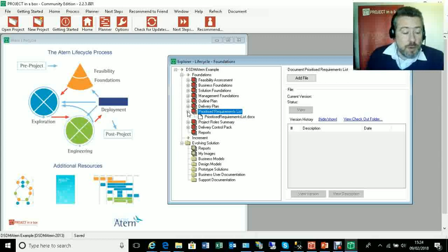And what you then do is you work through a series of repeatable cycles, and you say, well, this one's going to take 2 weeks and cost £1,000, and we're going to get as many of the important things done, as essential things done as we can. And we work our way through that until we get down to the less important things, or until we've spent all the money and used all the time.